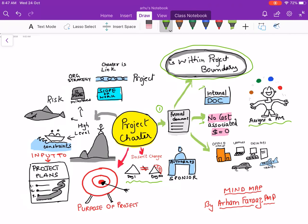The project charter is authorized by the project sponsor. A project charter contains high-level information on constraints, risks, milestones, scope of work, who the PM is, who the sponsor is, other points of contact, and entry and exit criteria. All this information helps to create project management plans, so the charter becomes an input to the project plans.